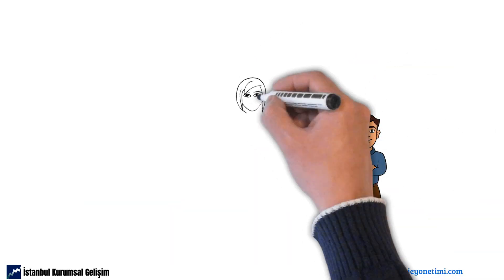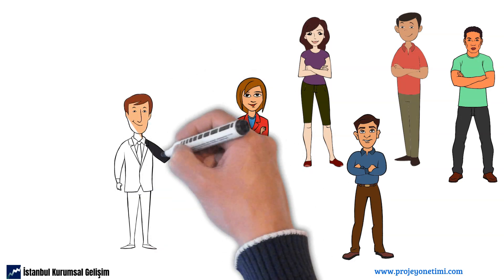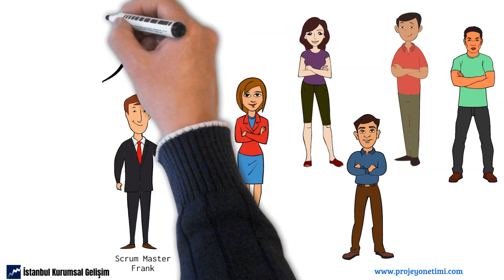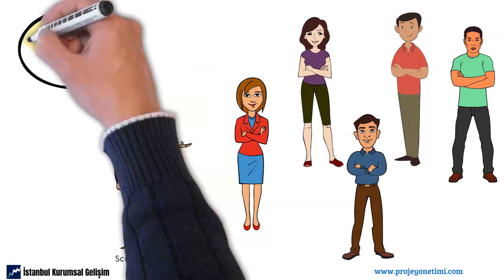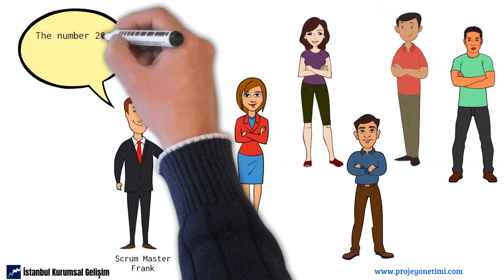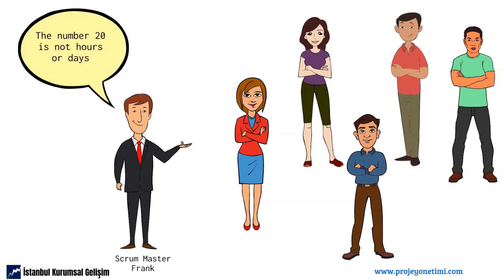Then Frank reminds the team: 'Guys, I would like to remind you that the equivalent of 20 is not 20 hours or 20 days. But from now on, when estimating other items, it will be easier for us to compare them to this item and rate them for difficulty and complexity.' By estimating other items, story points are given to each item in the backlog.